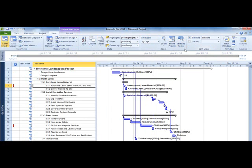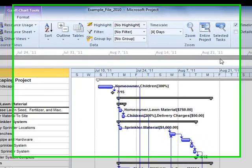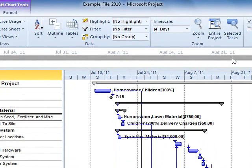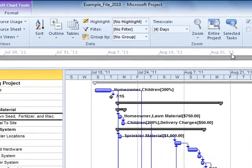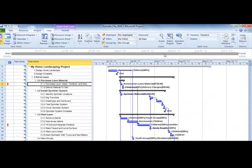Initially, a timeline has no schedule information on it. To choose tasks or milestones for the Timeline, first select the Timeline by clicking on it.